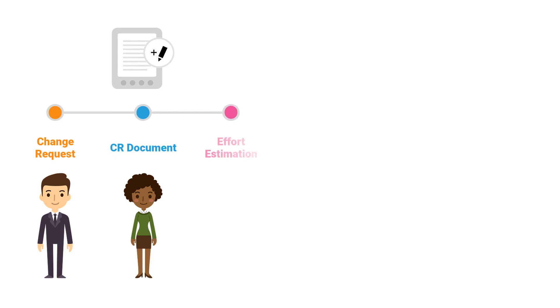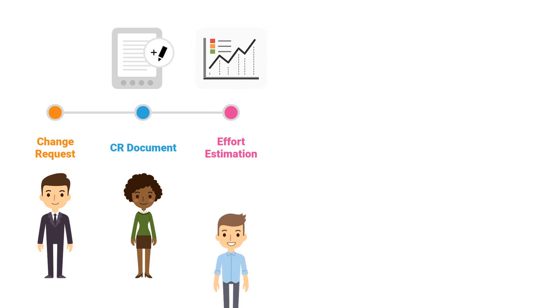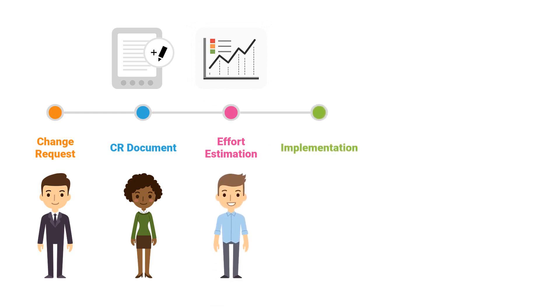The business analyst creates an effort estimation for the change request with help of the developer. The developer implements the change request after the SME has approved the change request. After implementation, the developer will test the process inclusive the change request.